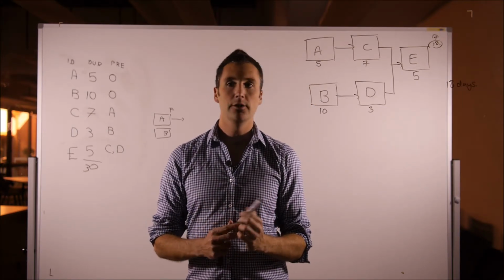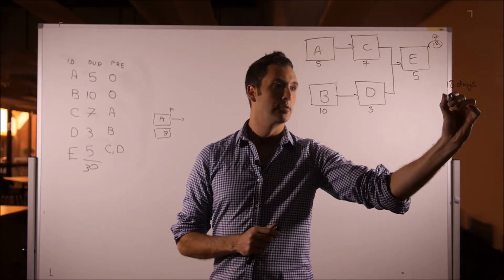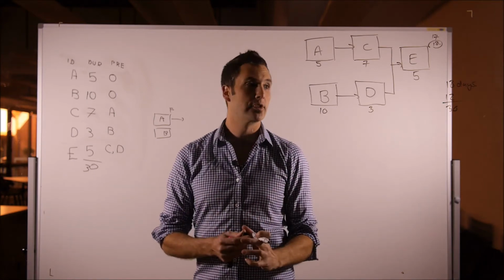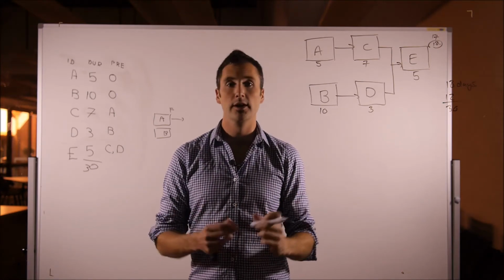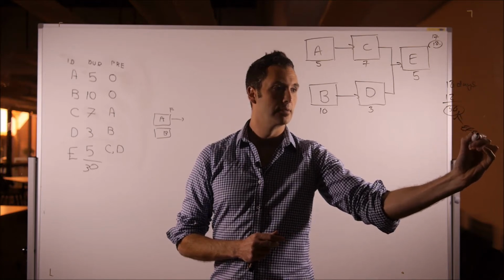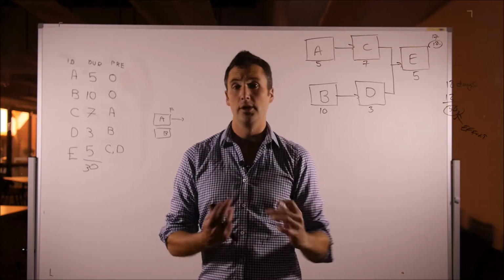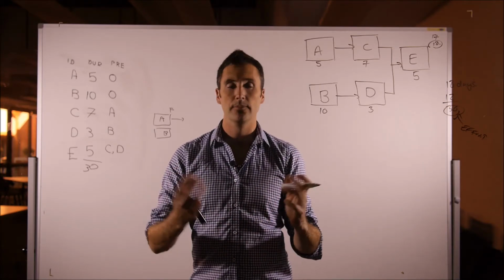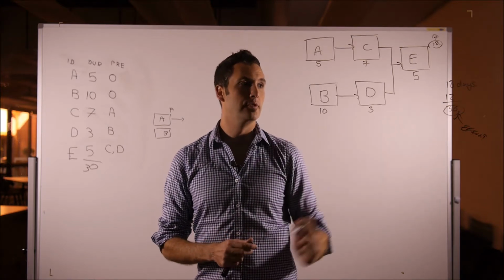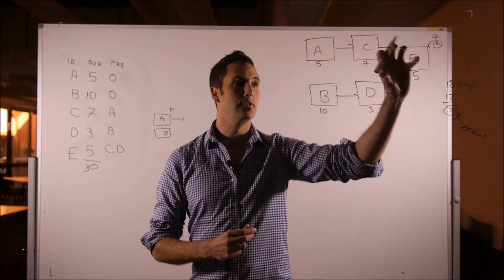Great. Okay, so we've got one benefit of scheduling. We've saved effectively 12 days. Because up here we said the project was going to take 30 days. That 30 is still important because that's still our effort. And if we talk about man hours and so on, we still need to pay for 30 days of labour, or whatever the rate is. But the actual physical duration is going to be 18 days, which is 12 days less. And this has been gained by running the activities concurrently.